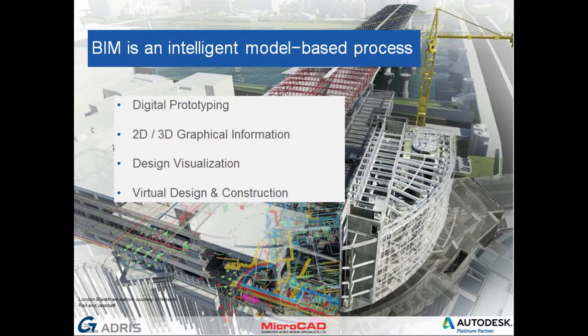And then obviously, virtual design and construction. So again, a little bit similar really, but virtually designing something, constructing it. You can go through the stages of the actual building being constructed. You can organise it against a Gantt chart or program and start seeing how the building's being built. There's lots and lots of aspects to it now, and people are starting to do more than just model something on a computer. They'll start to say, okay, we've got all this information, what can we actually do with it and how can we use it?